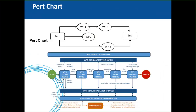A PERT chart shows links between work packages — for example, to proceed to work package three, you may need to complete work package one first. A work breakdown structure subdivides tasks, giving a clear representation of what completes the overall project. These tools help visualize how the project is linked and who is involved in certain deliverables. They can also be included at the proposal stage as part of the implementation section.